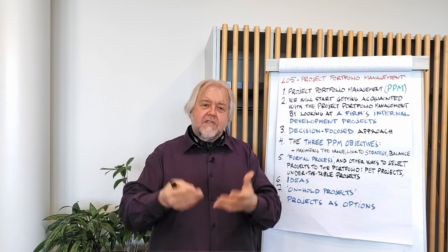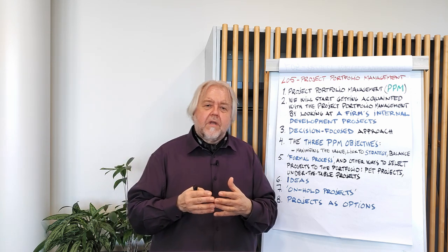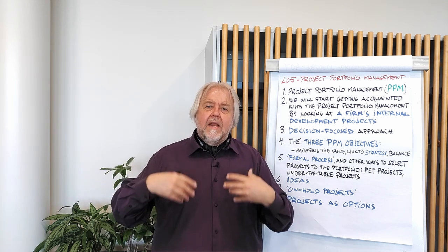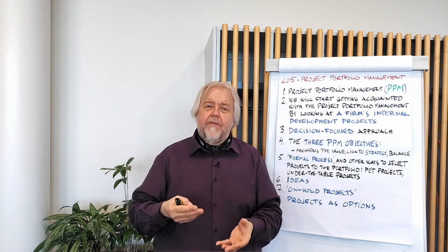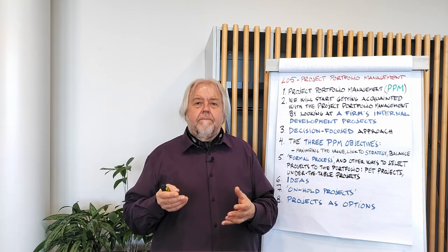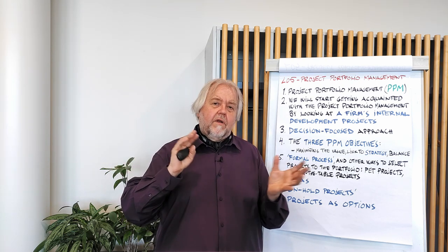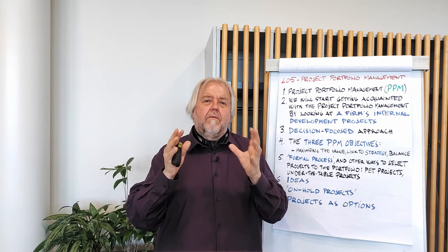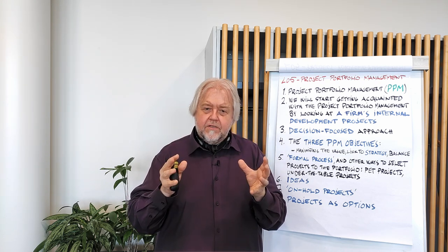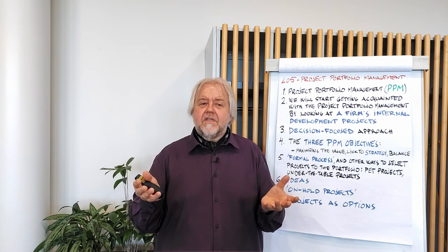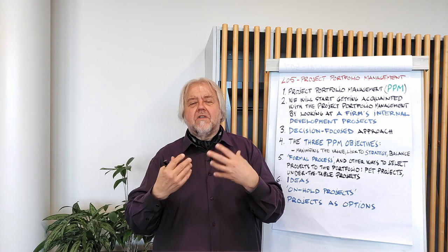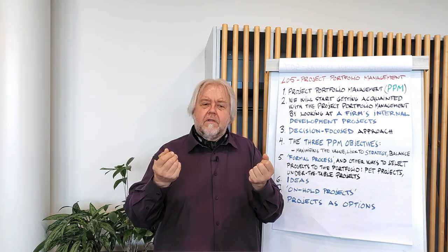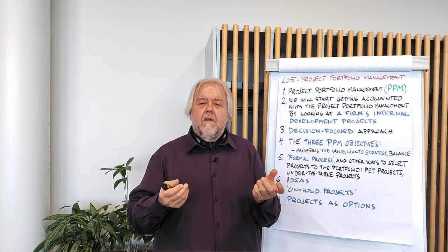And when we are answering these pre-prepared questions, we can then have a rather in-depth analysis and understanding and elaboration of the actual possibilities for success or then risks, or whatever the actual criteria are that we are going to use for our final decisions. Then we could also have market-related questions, for example, which is the obvious customer segment for this kind of product? Are customers willing to pay and how much for such a product? What are the biggest uncertainties in the market?